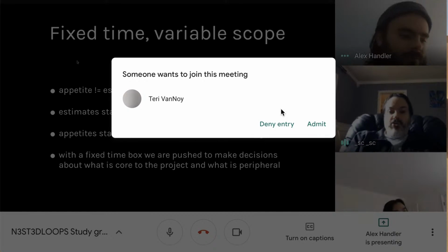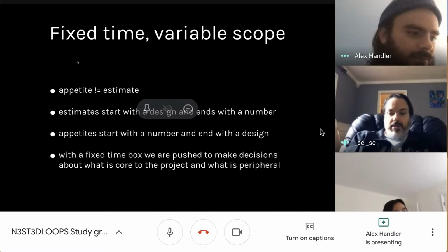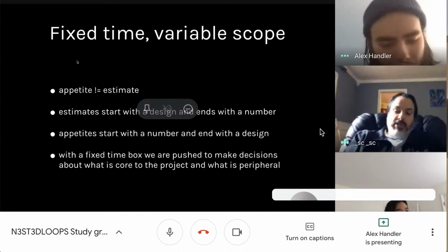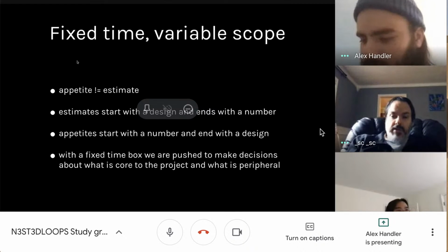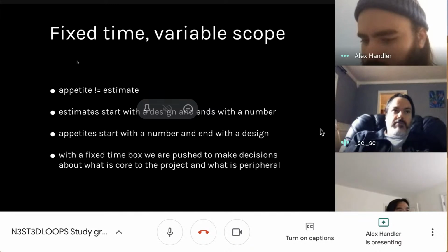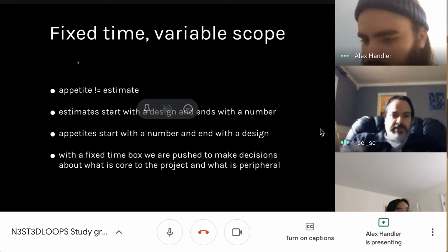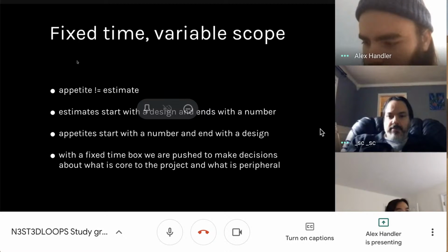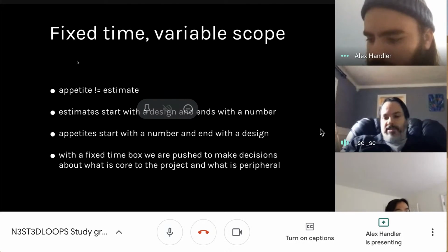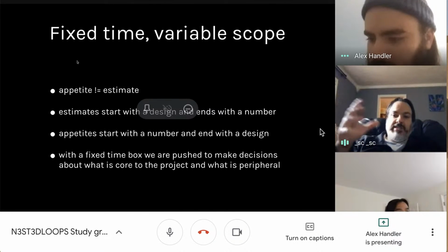You try to plan it as something that can be finished in this 6 weeks period, and it needs to be something meaningful. It seems like the deadline is fixed, but you can still negotiate what the scope is, which is something that would not happen in Scrum. The project is the project. You just get it in small chunks, but all the chunks are going to get done at some point.